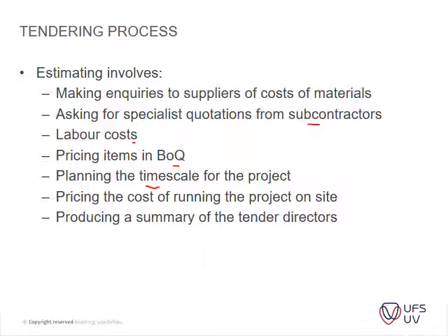So you need a realistic time scale for calculating your P's and G's. How long will your insurances be running on the project? How long will you have containers on site, etc.? Then the cost of running the project on site is priced, producing a summary of the tender.